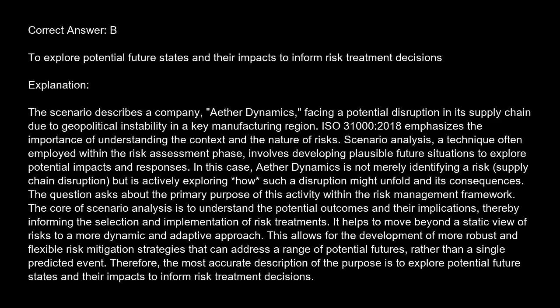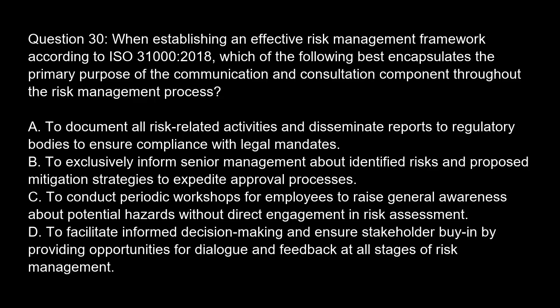The question asks about the primary purpose of this activity within the risk management framework. The core of scenario analysis is to understand the potential outcomes and their implications, thereby informing the selection and implementation of risk treatments. It helps to move beyond a static view of risks to a more dynamic and adaptive approach. This allows for the development of more robust and flexible risk mitigation strategies that can address a range of potential futures, rather than a single predicted event. Therefore, the most accurate description of the purpose is to explore potential future states and their impacts to inform risk treatment decisions.